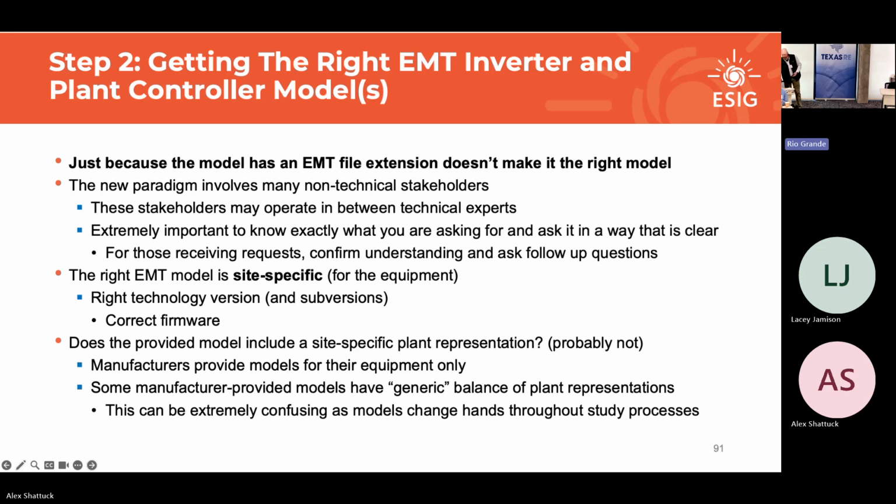Because there's a flip side, especially on the NERC side of things, when we had this conversation at the IRPS level, where there are service providers who say, I need full source code, I need full block diagrams, because I need to be the one to fix all the controller interactions and problems, which is not the way it should be. Because one, there aren't enough transmission service provider engineers to do that work for every interconnection. They're not the experts for each piece of equipment. And it's just not their responsibility, right? It's the interconnection customer's responsibility to give accurate data. So it's fine to review at a high level and flag it and send it back. But you don't need to be the ones who are actually testing and tuning it. You probably shouldn't be either.